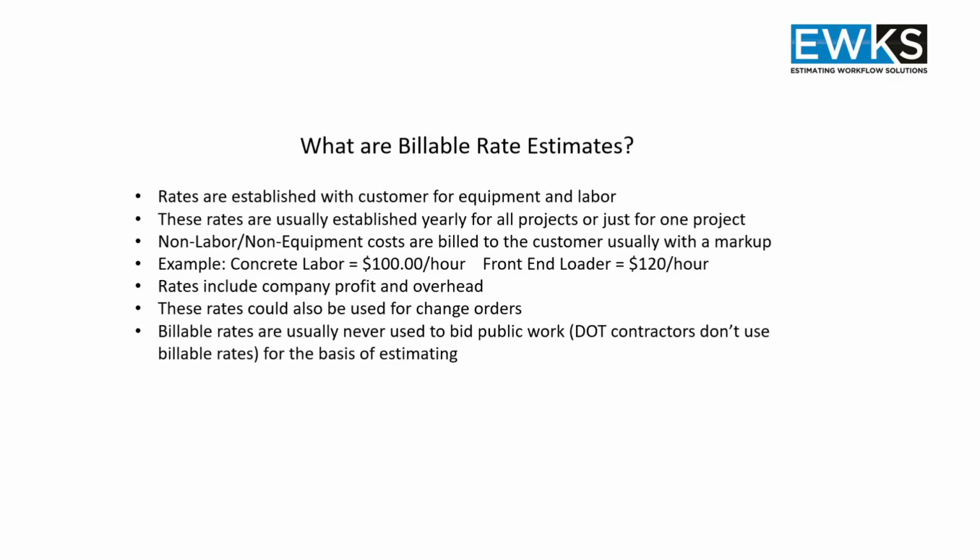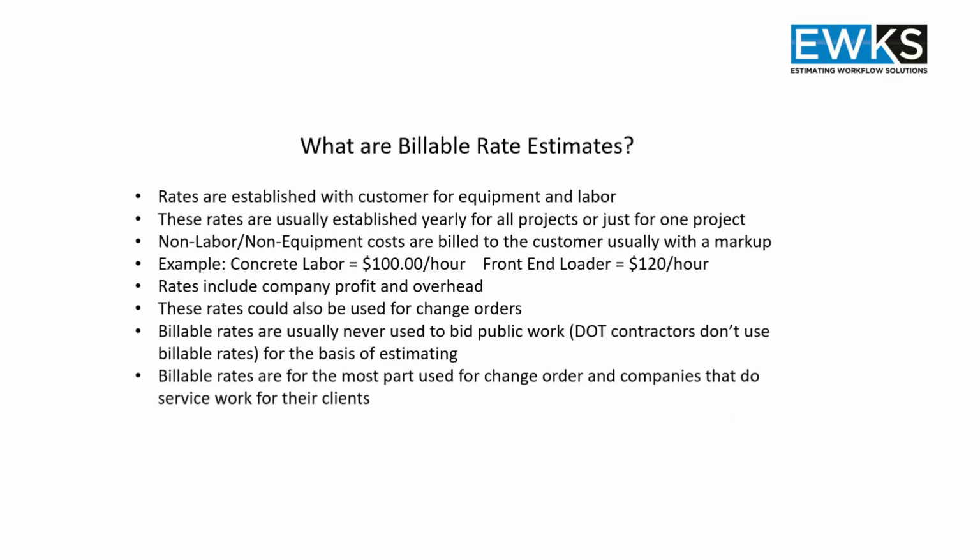Billable rates are usually never used to bid public work. Hard bids. DOT contractors, for example, never use billable rates. Never heard of one using it as a basis of estimating. And billable rates are for the most part used for change orders and companies that do service work for their clients.